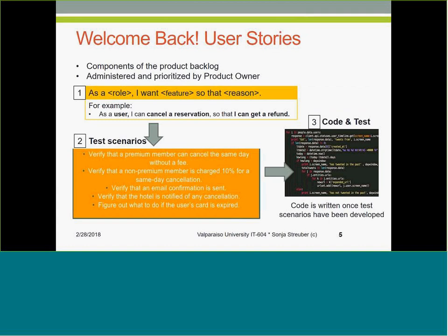So one of the important things that we discussed regarding agile or adaptive project structures is that we don't work necessarily with specific requirements in terms of, well, we do work with specific requirements. We don't set out these requirements directly as derived from a scope statement as we would do in a waterfall environment, but instead we develop what's called the user stories directly from vision.